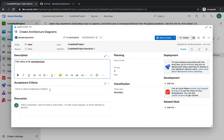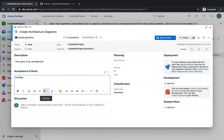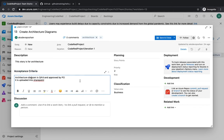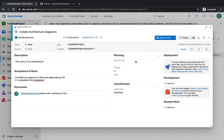In the description, you can add 'this story is for architecture.' The acceptance criteria is a placeholder where, if a developer says they're done with the feature, you define what 'done' means. For example, 'done means the architecture diagram is QA'd and approved by the PO and uploaded into SharePoint.' In the discussion section you can mention somebody and they will be notified to start working on it.